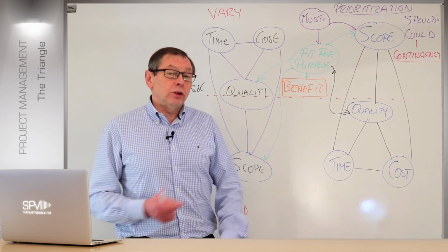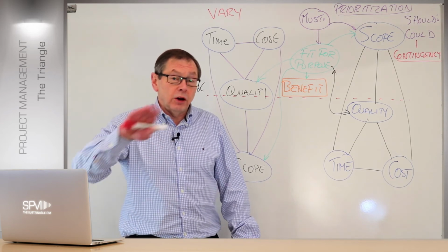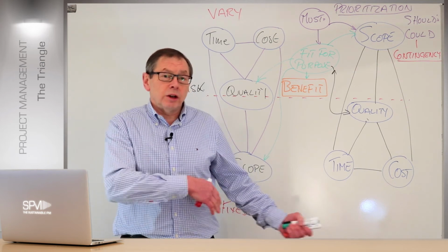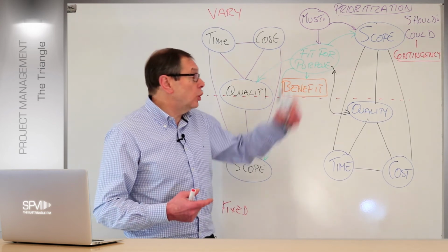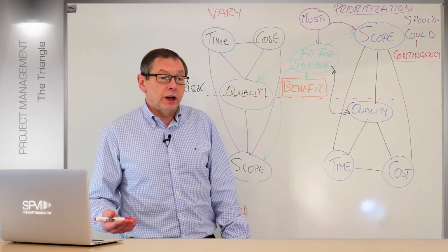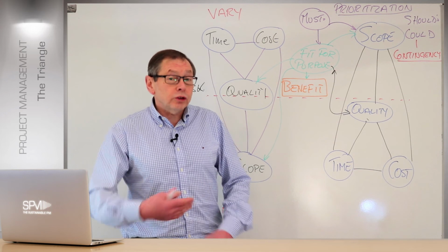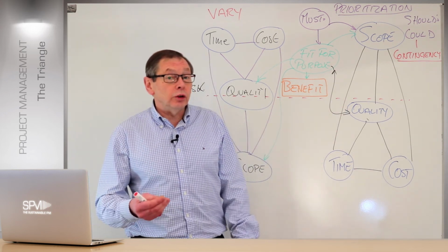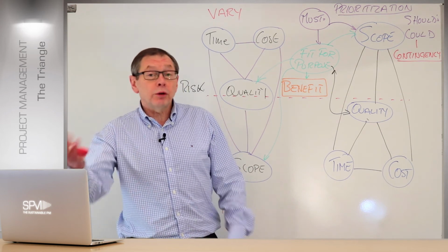And that's actually when we look at the scope scenario again, look at that session, you'll see when we come out, parts of those might end up being in the out part of the scope throughout the project. Initially, that session looked at what we defined at the beginning of it. Remember, any could that now becomes a won't, now becomes out of scope for the rest of the project. But sometimes it can come back in again if we suddenly find we're picking up time or the scope changes, we can pull things in. Good thing about that is that, remember, these coulds are not so crucial for the project, but we can still deliver them after the project's closed.